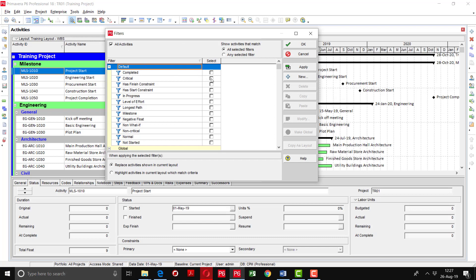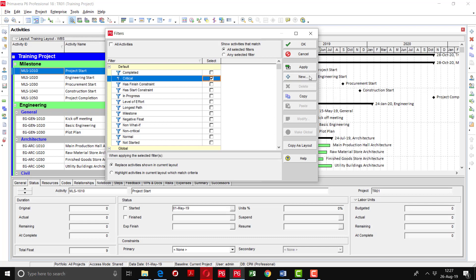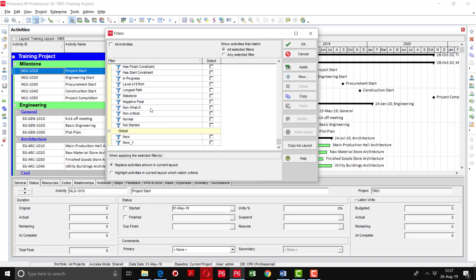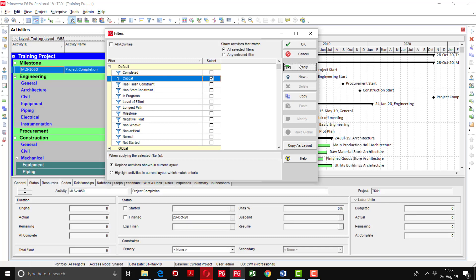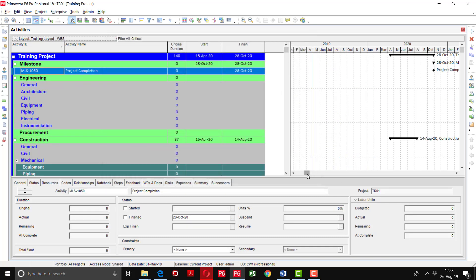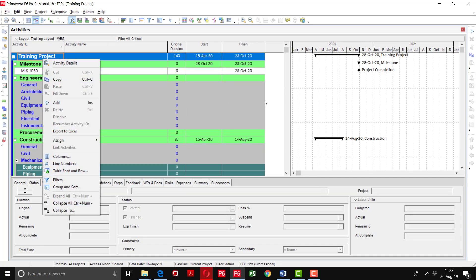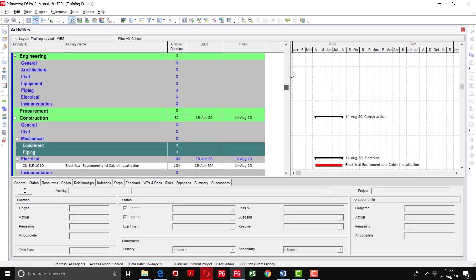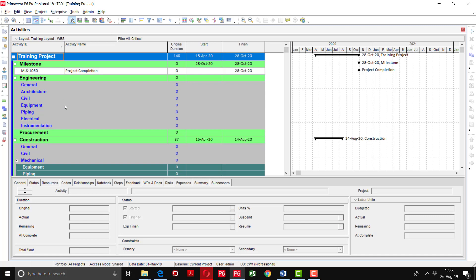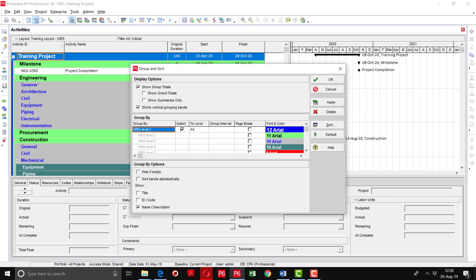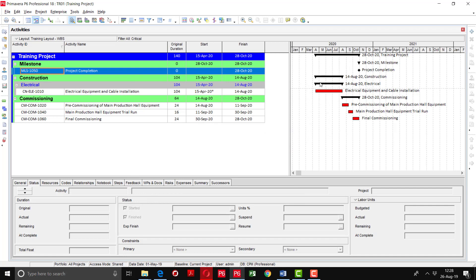Now I will tell you how to use different features of the filter. Suppose we want to see the critical activities — I will simply click 'Critical'. By default, you can see that some filters have already been created. I will apply it and you can see the critical activities shown here. These WBS rows are showing blank. If you want to hide these empty WBS rows, check the option 'Hide if Empty', apply, and click OK.